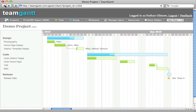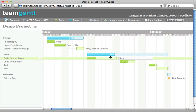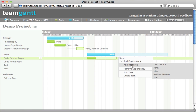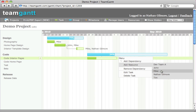Another very easy and very powerful feature of Team Gantt is resources. To add a resource to a task, simply hover over the task, select menu, add resource, and select the resource that you'd like to add to that task.